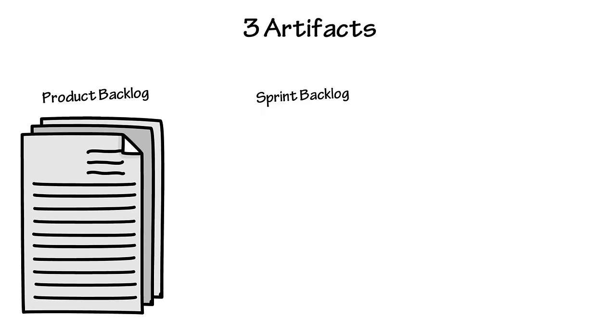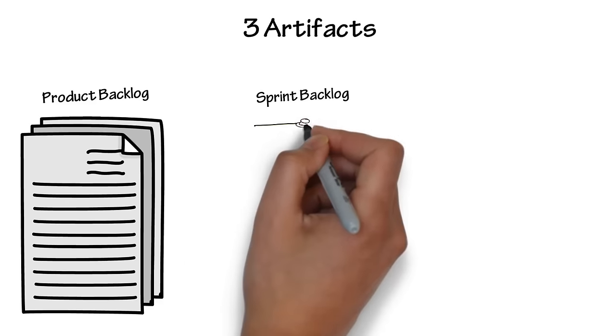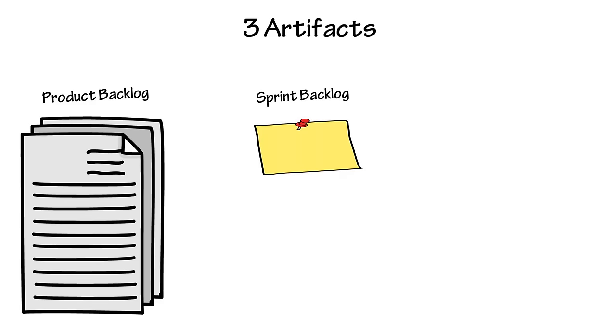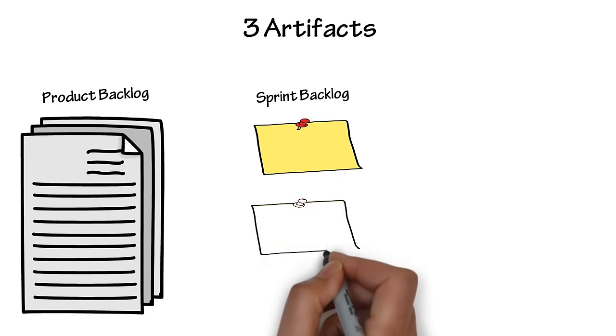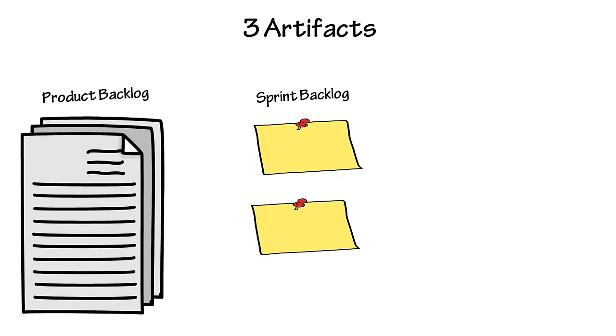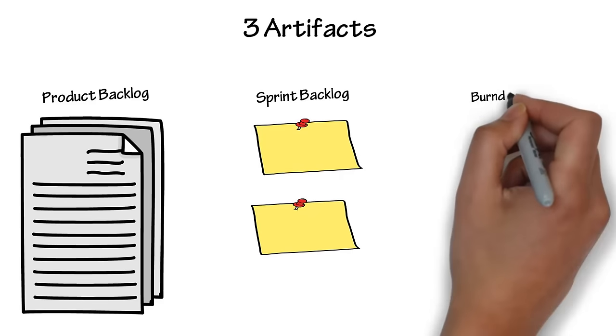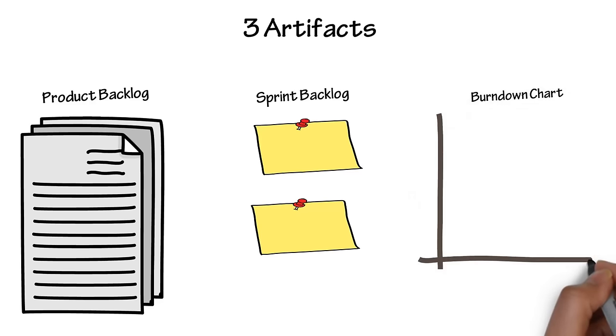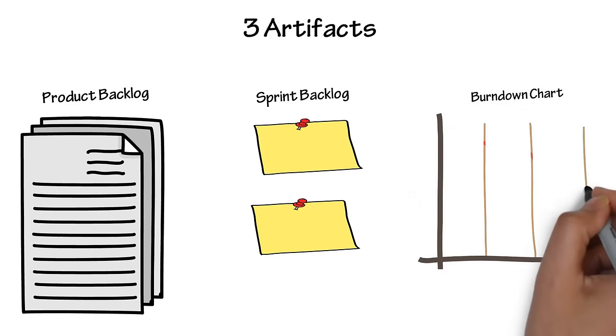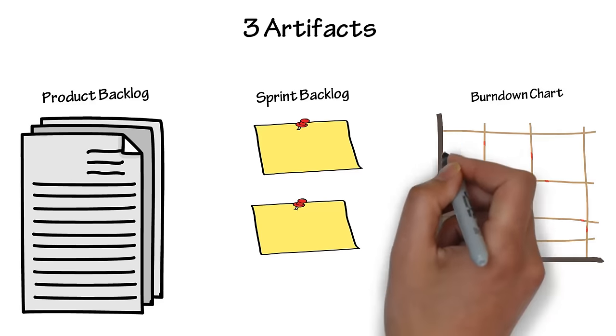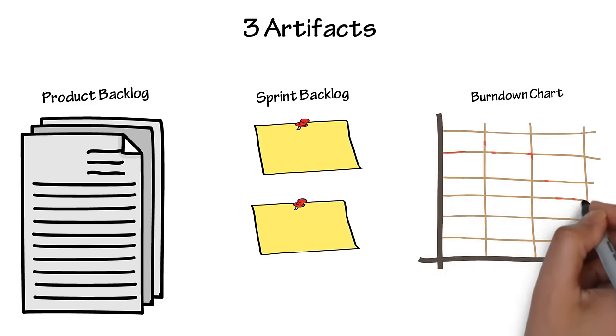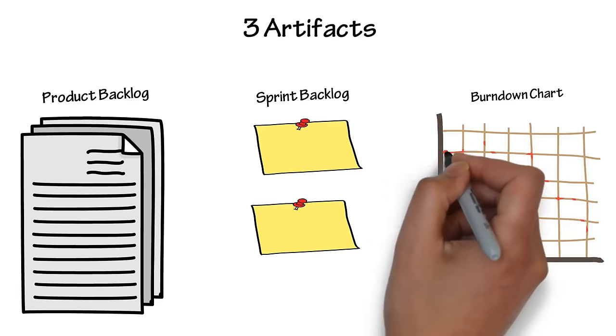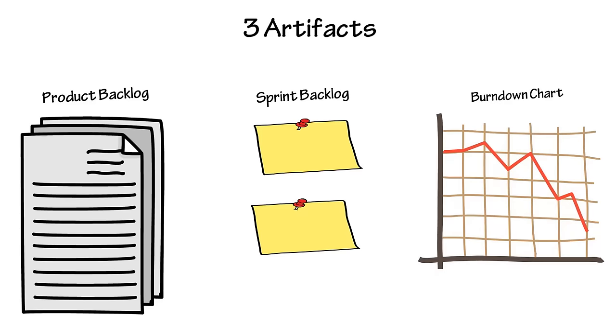The highest priority user stories go into the sprint backlog. These get estimated for size and are committed to for the next sprint. Burndown charts show the progress during a sprint on the completion of tasks in the sprint backlog. This chart should approach zero points as the work is being completed.